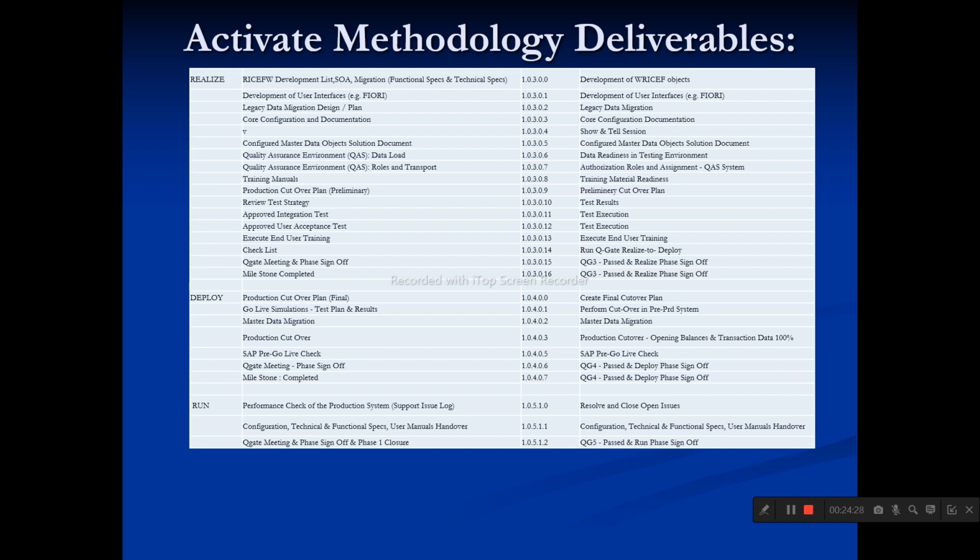Okay, so now the user acceptance testing will be done between the end user and the consultant. The end user is going to perform it. As a consultant, we are not going to do any kind of testing in end user acceptance testing. The testing will be done by the end user, and approval will be done by the manager. As a consultant, we support the user on how to perform and execute the process. Finally, the test scripts and screens will be recorded, and the documents will be created. The same thing we are also going to perform here, with the end user and the consultant.